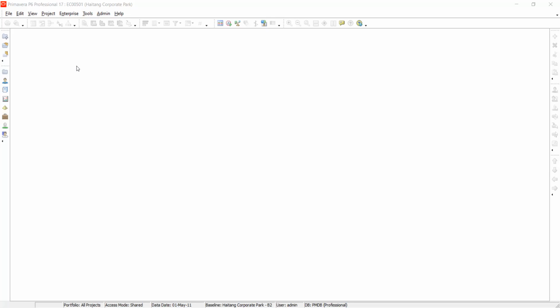Maybe the other activities depend on that. Yeah, so for example, approval of designs, because when your designs are not approved, you cannot start anything. So that one may have a higher priority than any other activity, because all the activities may be depending on that. If it is not approved, you're not going to do any work.